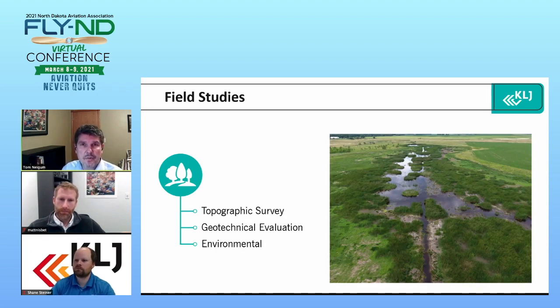Once the contract's in place, then one of the first things we want to do right out of the chute is complete the field studies. I've listed a few here that typically come up: topographic survey, geotechnical evaluation, and then environmental field studies that need to be done, to name a few.